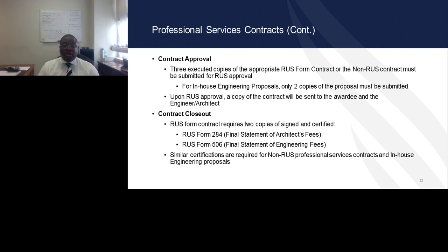awardees using a standard RUS contract would submit RUS Form 506, the final statement of engineering fees. For architectural contracts, the awardee using a standard RUS contract will submit a RUS Form 284. Similar certifications are required for non-RUS professional services contracts or in-house engineering services proposals.